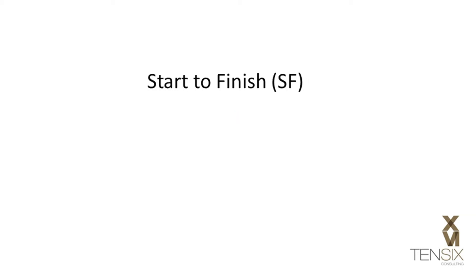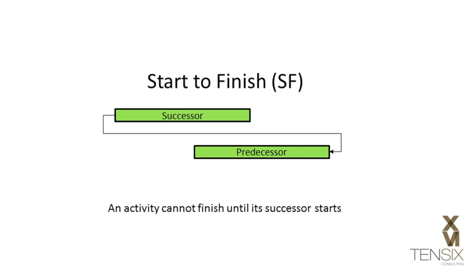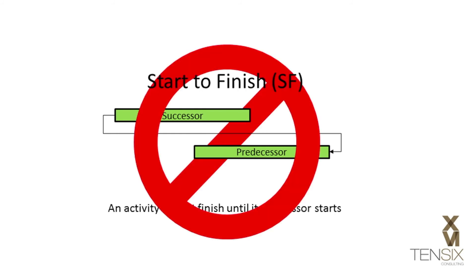Start to Finish is a somewhat confusing relationship type and is the least used of all the activity relationships. It basically states that an activity cannot finish until its successor starts. Most industry best practice guidelines actively discourage its use, as there are very few examples of a truly practical purpose for this relationship, and therefore we recommend you avoid using it.